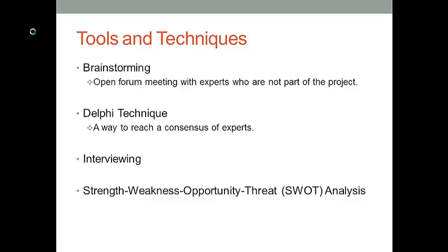Let's say our project is to manufacture some smartphone. Once our project starts, we could meet an issue that we don't have enough developers to develop mobile apps. Then this risk should fall into the weakness category because this factor is from our project team. We also predict there could be some new smartphone manufacturers in the market. Then this risk should fall into the threat category because new competitors is not an issue from our team, but from the market. This is the point you want to pay attention to.